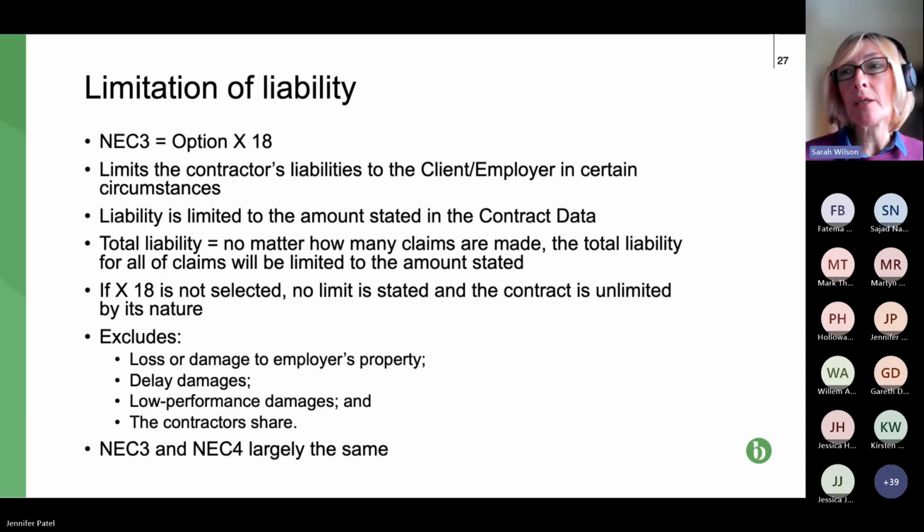Well, expensive remedial works, building might have to be closed down, people using it might have to be decanted elsewhere, alternative accommodation provided, there might be loss of profit, because the people using the building might vacate and move elsewhere, all sorts of things, and all of that would be direct loss relating to the defect. So, just be careful of that.